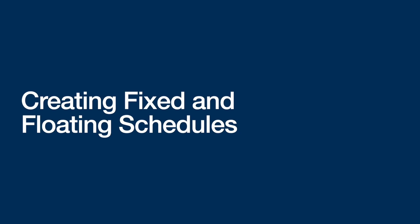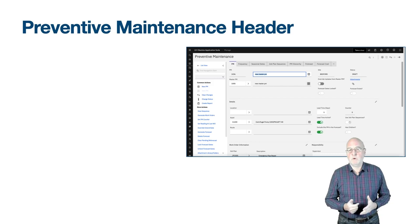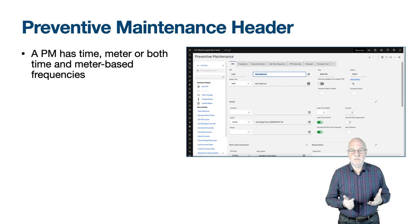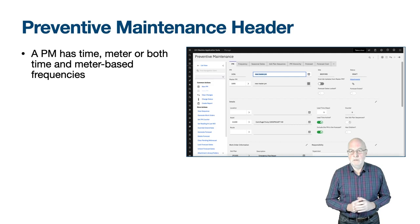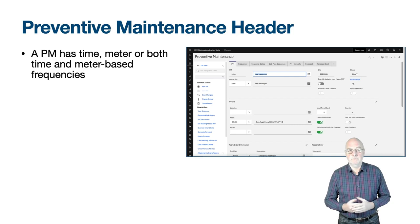The preventive maintenance application is used for any requirement to generate work orders on a frequency basis — either time, meter, or a combination of time and meter. It is used for the generation of preventive maintenance and inspection work orders. The work performed is normally defined on a job plan, but PMs can generate work orders without a job plan, and PMs need not have any frequency details — something I call an on-demand PM.